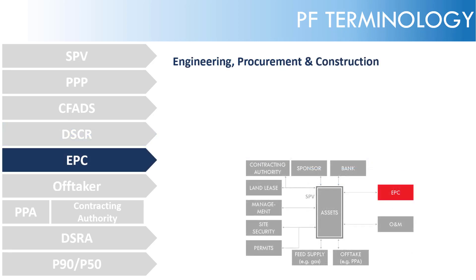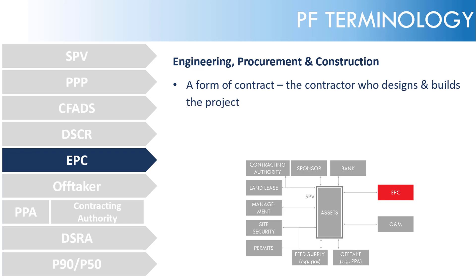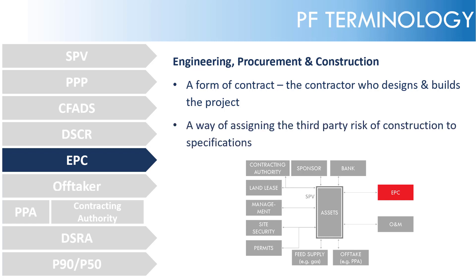EPC: Engineering, Procurement, and Construction. This is a form of contract where the contractor essentially designs and builds the project. The contract is a way of assigning the third-party risk of constructing the project to the specifications. From the EPC contractor's point of view, this risk is often mitigated by liquidated damages, which limits the EPC's liability.